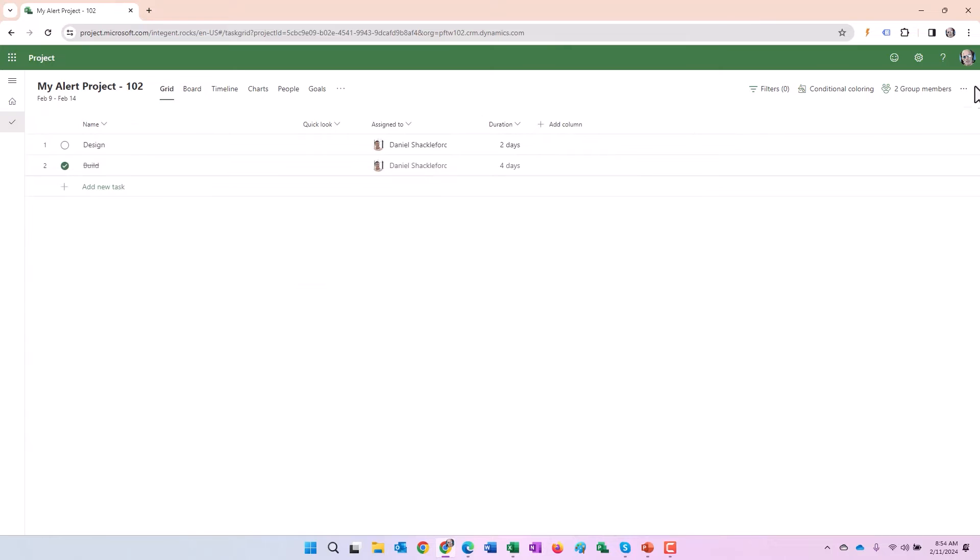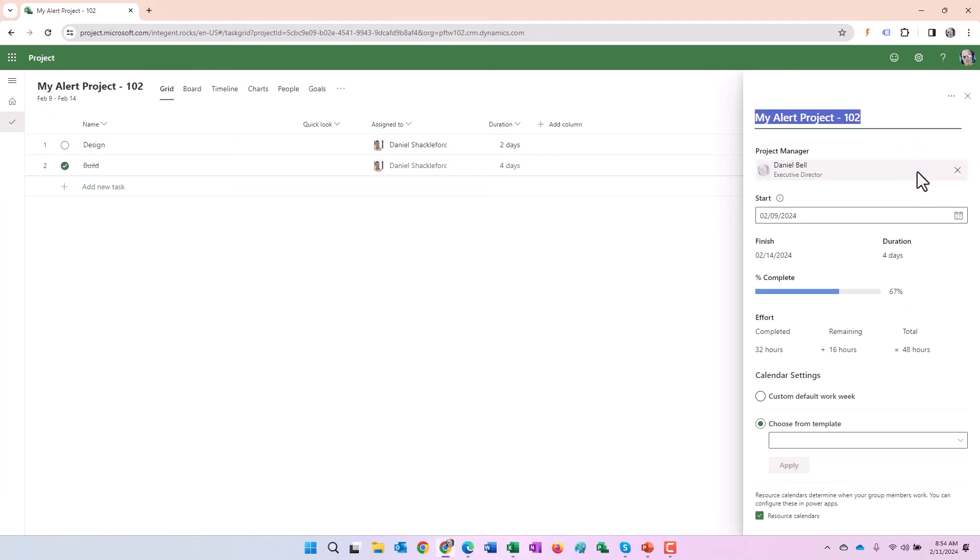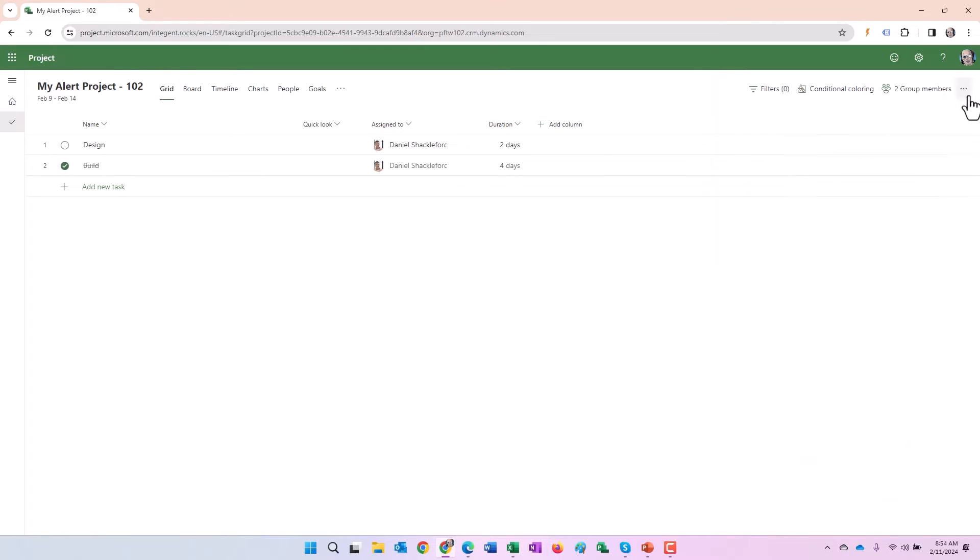Remember the ellipsis in the top right. And notice that copy project is disabled. It's grayed out. We can't do it here. Let's go ahead and navigate to project details and select the ellipsis again. And again, notice delete project is disabled as well. That is because we are in the default interface but accessing a project that is in a custom environment.